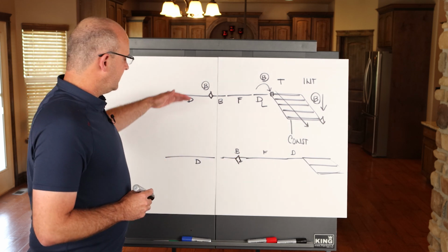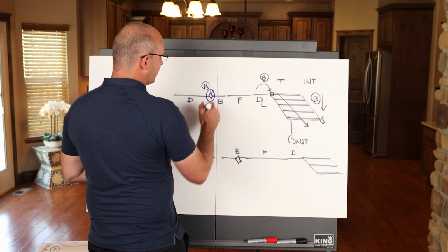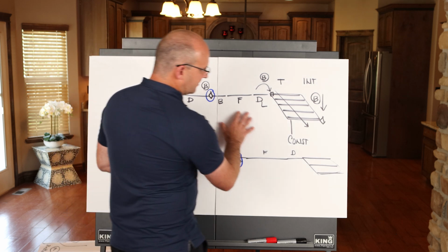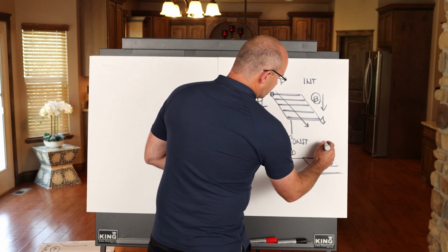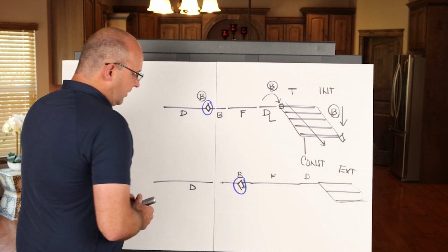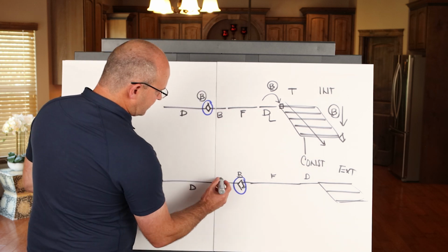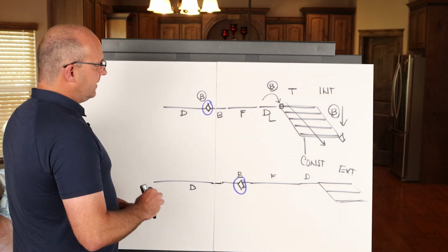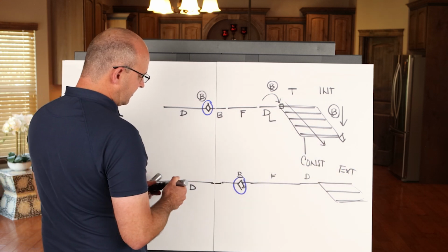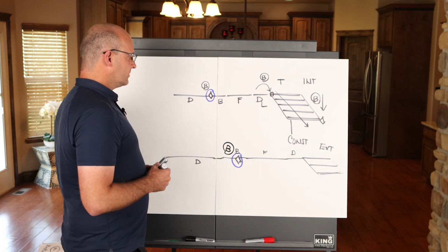So I want you to know that there's a multi-dimensional view of this. Your milestone for this work might be different than your milestone from a design perspective for your actual exteriors, or let's just say hypothetically some other phases. So when you actually go into schedule the design team, I want you to understand those nuances. So step number one would be to make sure that working from construction back, you know when you have to be complete, obviously with a buffer for each of those design phases.